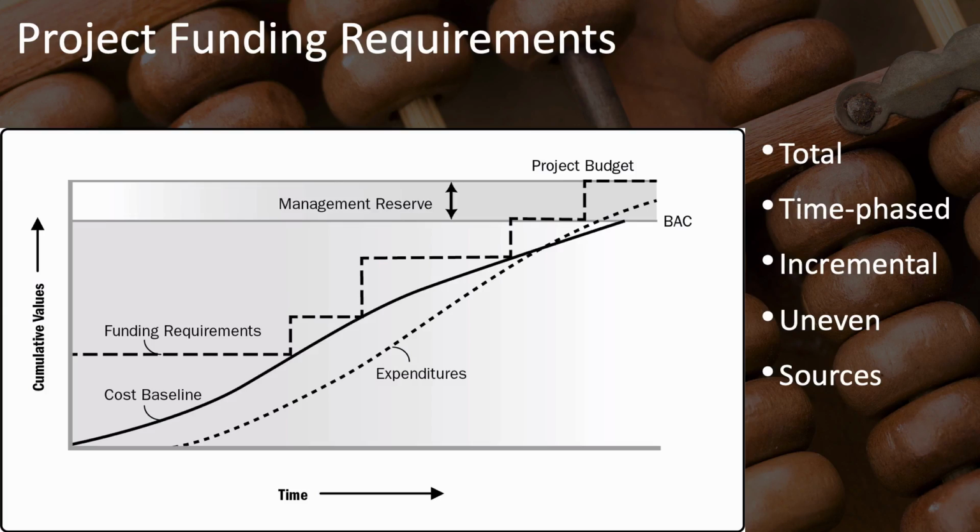In fact, they probably should be tied to key milestones in your project where you can verify at phase gates that you have been able to accomplish what you need, and you decide at your phase gate whether to proceed and how to proceed with the project. At that point, you could get the additional funding that you need for the next phase.